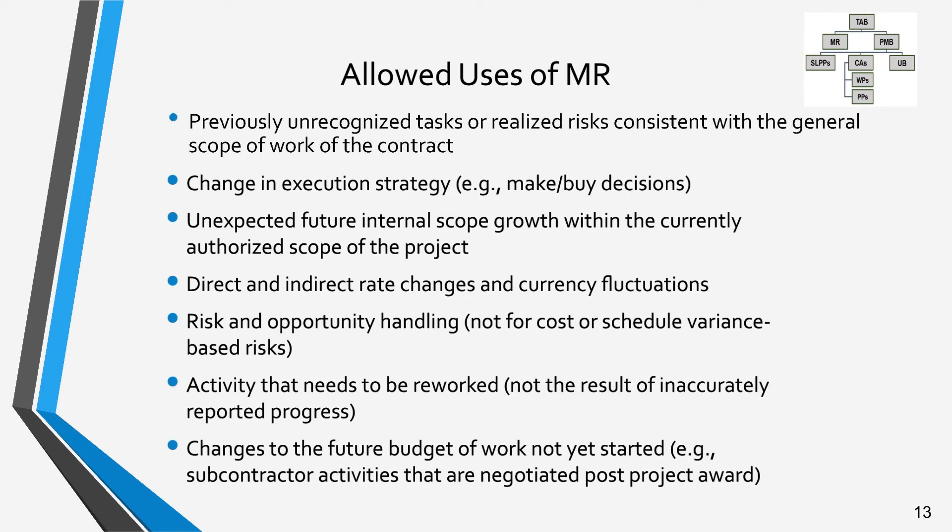MR may be used for risk and opportunity handling. However, allocating MR for cost or schedule variance-based risks is inappropriate. MR may be used for work that needs to be repeated; however, it is not appropriate to be added as budget when progress has been inaccurately reported. MR may be used to change future budget for work not yet started. For example, the baseline may have been estimated prior to final negotiations of subcontractor work. MR may be used to increase the budget associated with final negotiations, however not if the effort has begun.